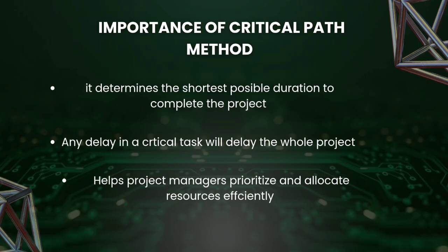After knowing what critical path is, we should also know the importance of the critical path method. It determines the shortest possible duration to complete the project. Any delay in a critical task will delay the whole project. It helps project managers prioritize and allocate resources efficiently.